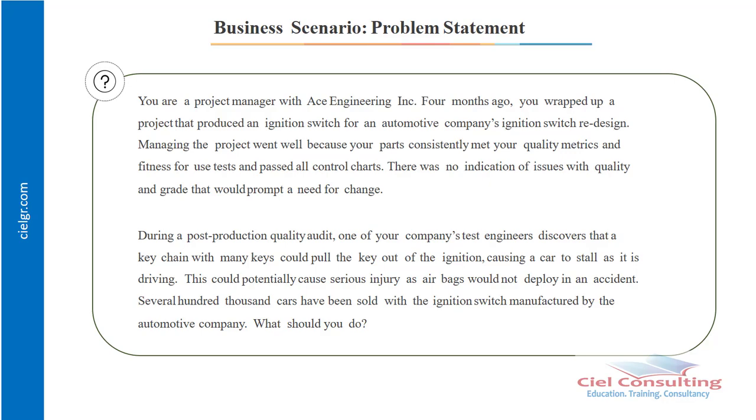So one of the things you can do is, of course, root cause analysis, to determine what gave rise to this. And after you've done the root cause analysis, you may want to implement corrective actions, either by doing a recall of those vehicles to fix the ignition switch, or you can also set up service centers at different locations where the owners who have bought those vehicles can take their cars to be repaired, as the case may be. So these are some of the measures you can take to fix this problem.